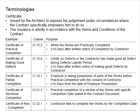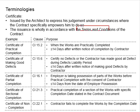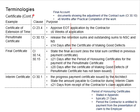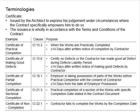Let us proceed with the discussions of the terminology used in the contract. In this video, we're going to discuss about the certificate. This certificate is not the certificate that you obtain from a bachelor degree or any certificate of participation. Although the term is the same, it is referring to the written notice issued by the architect to express his judgment under circumstances where the contract specifically empowers him to do so. In short, this certificate is issued by the architect wholly in accordance with the terms and conditions of the contract. We have quite a number of these certificates, and their conditions can be referred from different clauses.